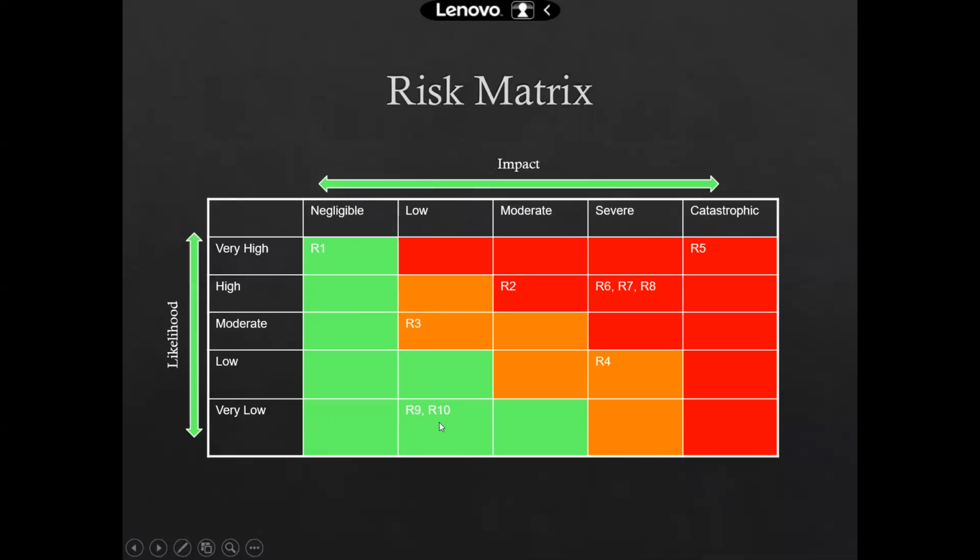And over here in the green one, these are the low risks. You can take care of them later on as well, but the highest priority at this point of time for the mitigation of the risks should be the red, and then the orange one, and then the green one, right? I hope it makes the concept of the probability and impact matrix clear. And now that you have seen that we have analyzed what different risks can affect the business, and what the potential impact of those risks on your businesses is, right?